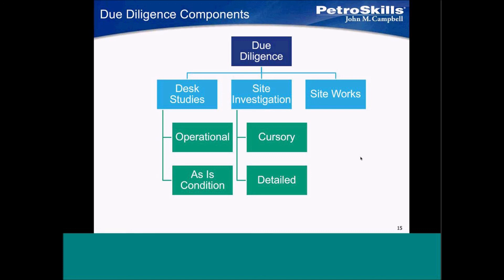Say you want to take a mini-shutdown to open up a vessel — maybe take something out of service for a couple of hours or half a day. If you go and ask the ops person, they're probably going to tell you no, unless you have not only a valid reason but can document these things. Maybe you want to take that quick turnaround to take that vessel out of service so you're fully prepared when the turnaround comes around.